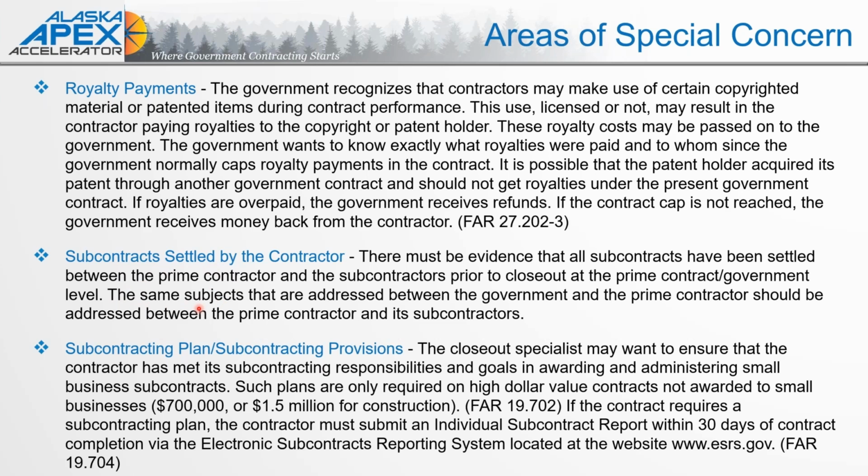And again, you should have a procedural process in play when you have contracts with subcontractors of obtaining releases, a signature saying, yep, we're happy, we received everything. So if someone from the agency is coming back a couple years later trying to close something out and they say, hey, we had this communication, we found this email in the contract file, was that resolved? You'll have that documentation to show that everything is good.